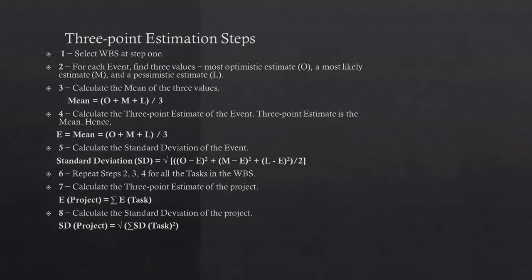Calculate the mean of three values: mean = (O + M + L) / 3. Then in step 4, E equals the mean, which equals (O + M + L) / 3.